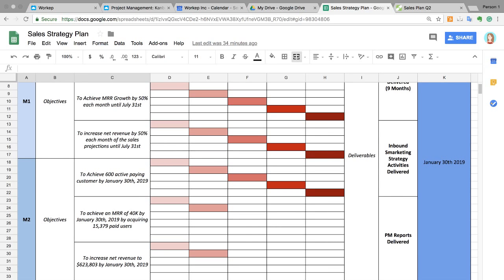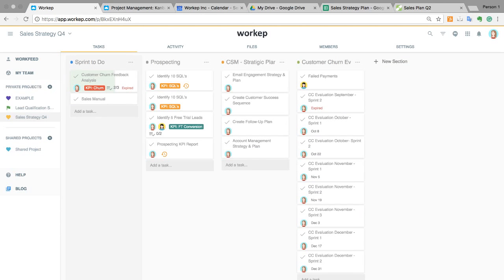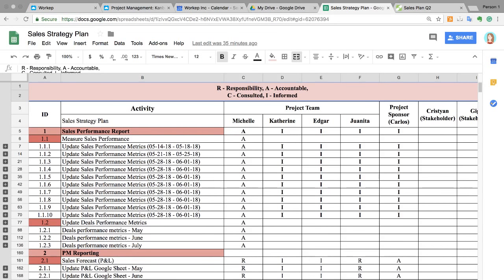Now, with the deliverables in mind, and with our organization of the different parts of the project, I was then able to further break down the work, and organize who needs to do what, and who needs to be accountable for the different parts of the project. So to manage that, I used the classic RACI chart. Again, this is another classic tool of the waterfall method.